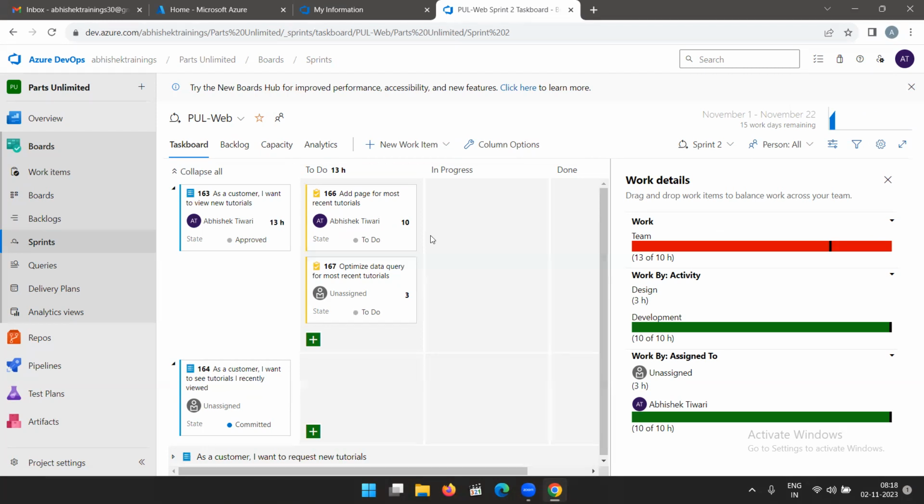Is this estimate or worked hours? No, earlier it was assigned 5. Now, when I was working on the task, I got to know that it would take some more time. This is the estimated task only, right? Yes. So I myself updated it to 10 hours. Okay, so I'm using my full capacity of the sprint. After the off, my full capacity for development was 10 hours, right? Because 1 hour per day.